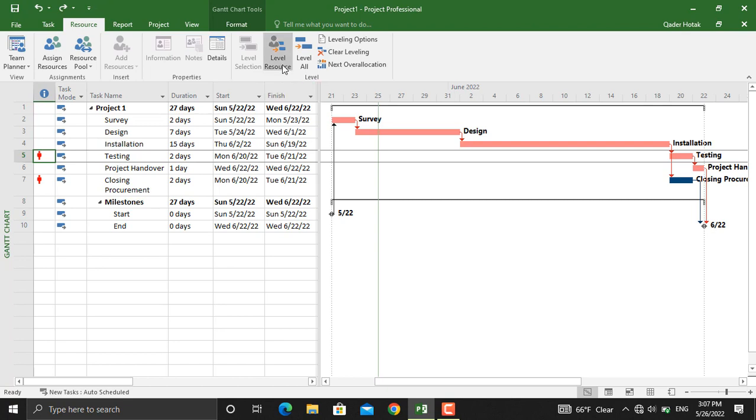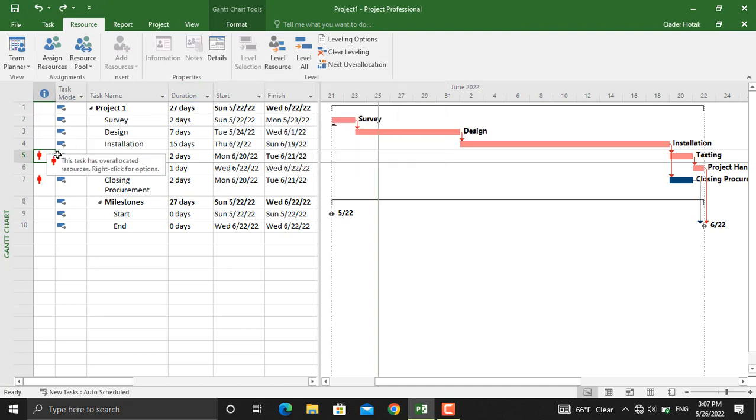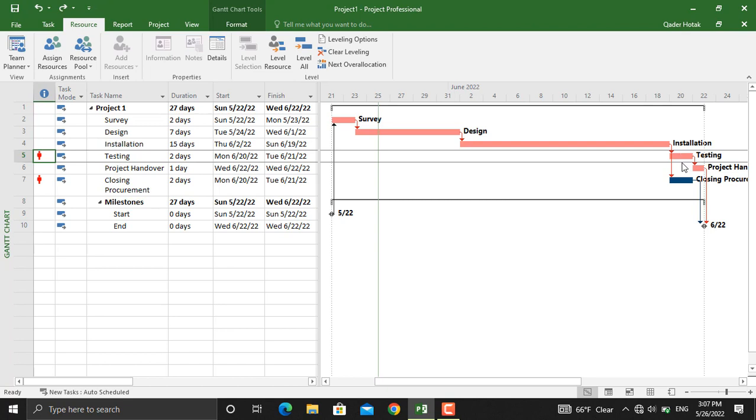If you click level resource, what it will do is it will level the resources for the current activity or the selected activity. For example, at this time Alex is busy with closing procurement, so what Microsoft Project will do is it will transfer some of the task from the testing after the closing procurement is completed, so that Alex can be free and perform that task.